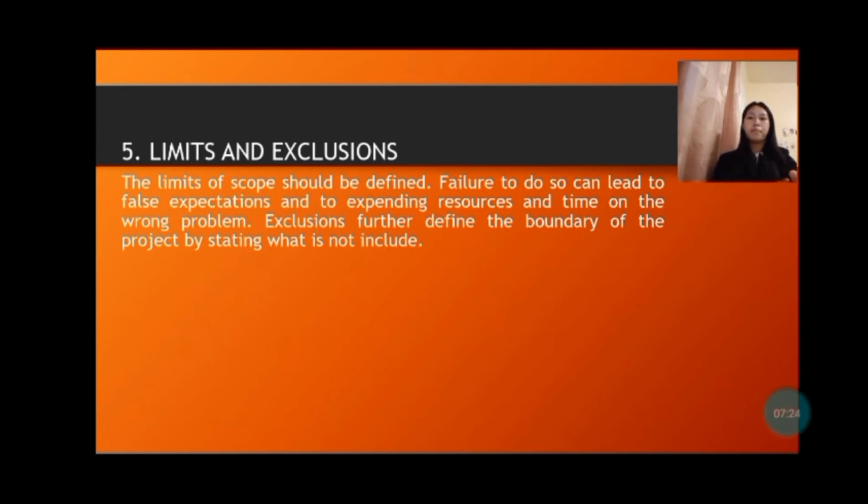The maintenance and repair will be done only up to one month after the final inspection. The client will be billed for additional training beyond that prescribed in the contract. So that is limits. And what is exclusion?